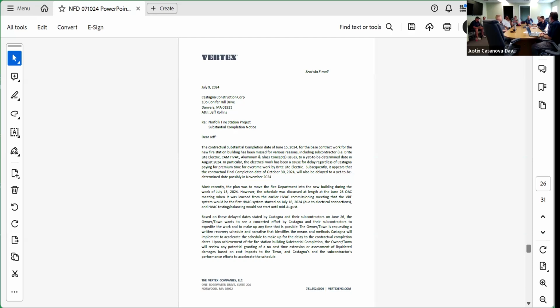Something died, they'd have to come back. So I think the plantings are all warranted, right? Yes. Any kind of grass or lawn, they have to establish a full stand of grass. There are some mowing requirements. So there are a lot of these jobs, even though the job's finished and it's occupied, landscaping type items, where they're coming back during occupancy. So it's not unusual.